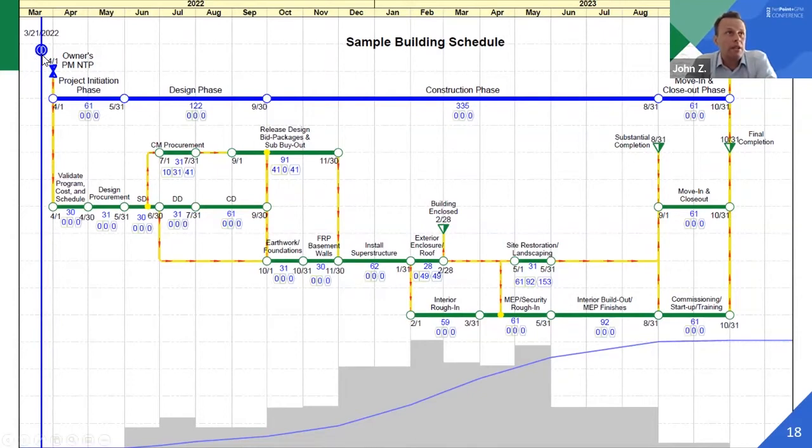In P6, although you can change it, the default is the beginning of the day. So say 8 a.m. So what we're going to see is when we export this file into P6, the data date is going to move by 1 day.